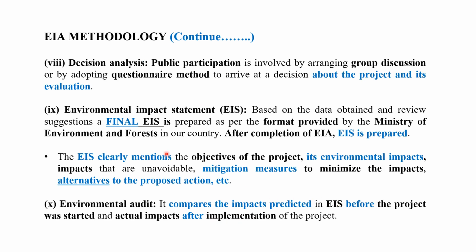Next, we can see the decision analysis. As I told you, once you prepare the draft EIS, it has to be placed before the public for decision and feedback. Public participation is involved by arranging group discussions or adopting a questionnaire method to arrive at a decision about the project and its evaluation. A final EIS is prepared as per the format provided by the Ministry of Environment and Forest in our country. So after completion of the EIA, we have to finalize the EIS.